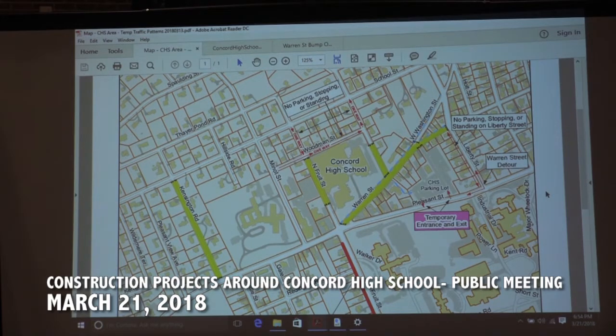During busy times, like in the morning when everybody's coming to school, we've got buses, and maybe parents coming to drop off kids, and teachers coming to school. We still need to do this one-way thing. We'd like the drop-offs and pickups somewhere else, but there's going to be a lot of teachers and staff who need to get into the parking area here. So Matt will be working this out with the high school folks, but they're talking about maybe making a little placard system, a little colored piece of paper or something. People that need to come in here will have it in their windshield. We'll have some flaggers up here, and those people will be allowed to come in, and other people will be sent off to the drop-off pickup area. We're just trying to keep too many people from coming in. That's something the school will work on.